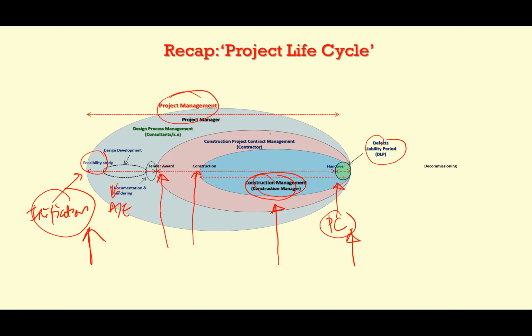There is another terminology, which we call contract management. Before the site possession, this period, we call the pre-contract period. The pre-contract period is when the contractor needs to submit a few things, such as the insurance, the performance bond, and even the preliminary work program.